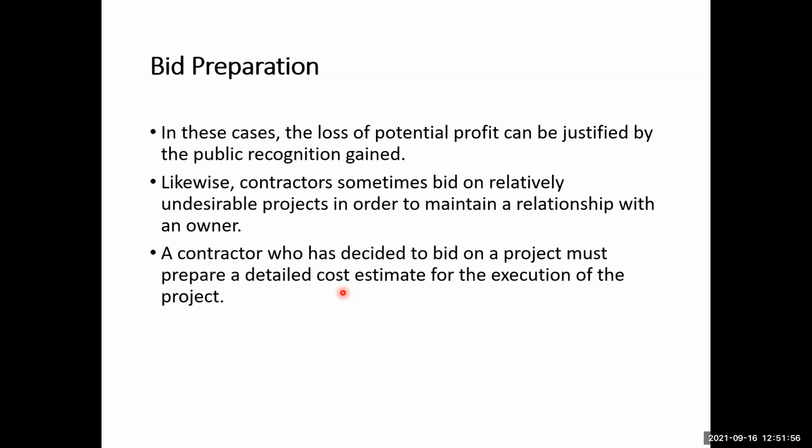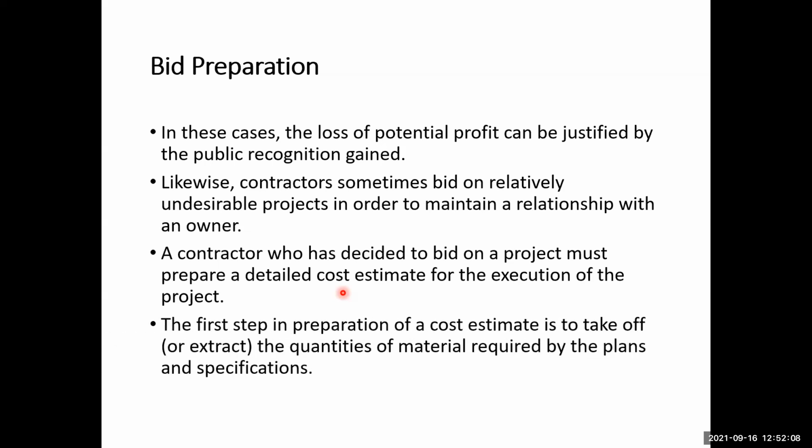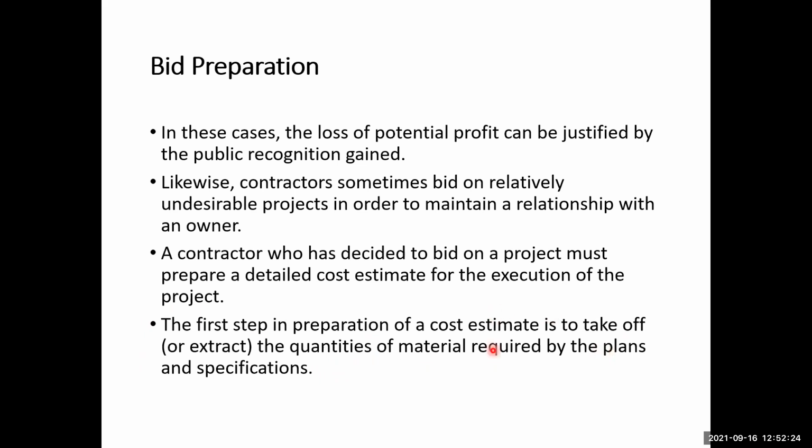However, this topic is very broad. Of course, there are not only these considerations, there are, of course, many considerations as well. The first step in the preparation of a cost estimate is to take off the quantities of materials required by the plans and specifications. Okay, so here you can see that this is a very important sentence. Here we can see that required by the plans and specifications, which means that